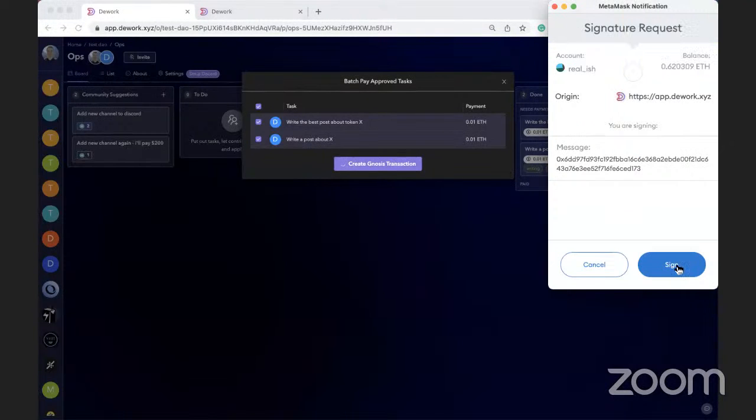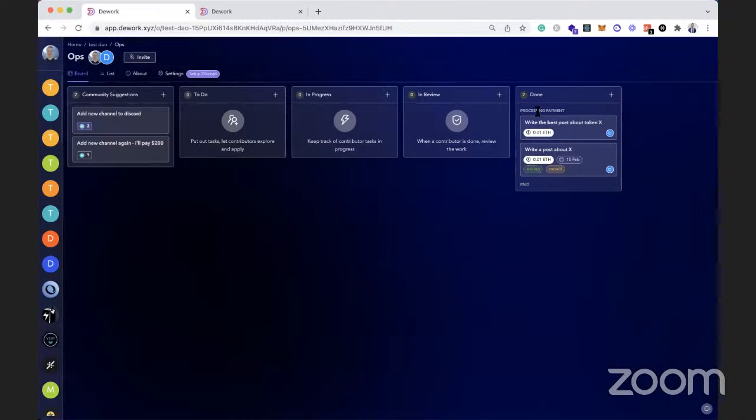And then you might have a specific... Go on, sorry. I think for our guidelines and instructions on this, if we were going to do batch payment processing, we would require that it be done once a week, all projects all at once. Our guidelines to the community would be that we can't just pay as the work is done. This has to be batch processed. As it gets bigger and bigger, the sheer number of payments would get unmanageable. So it would be a weekly task to go through, clear down and do the payments.